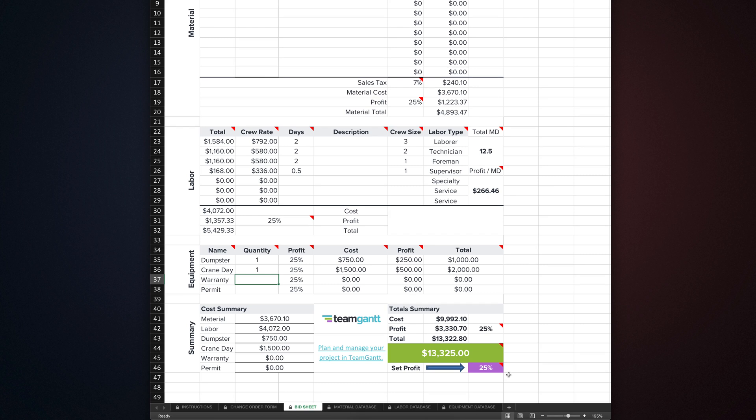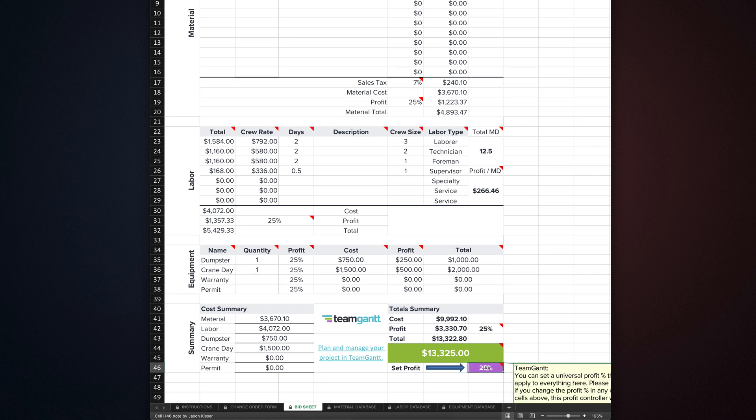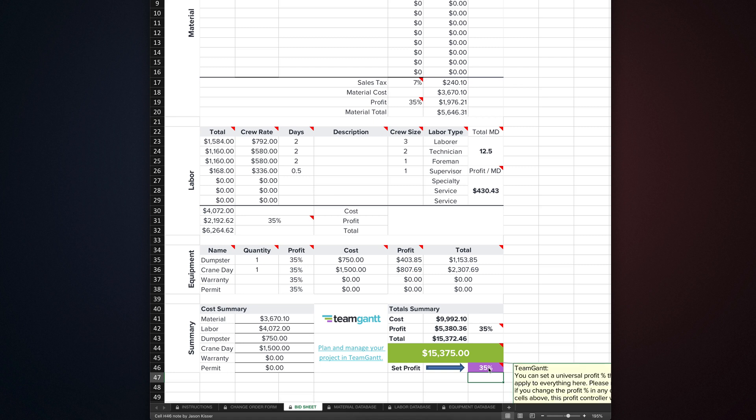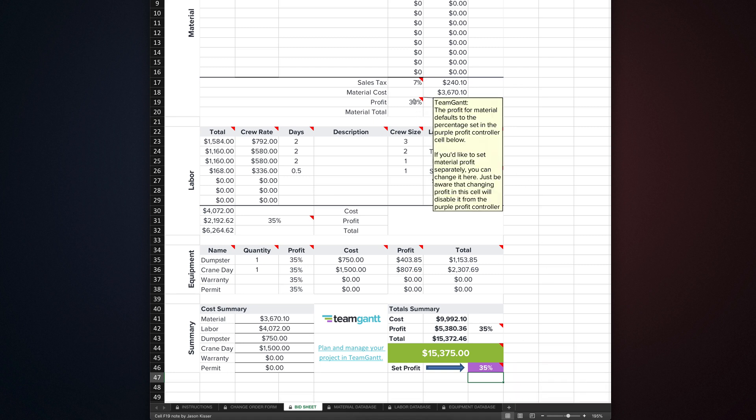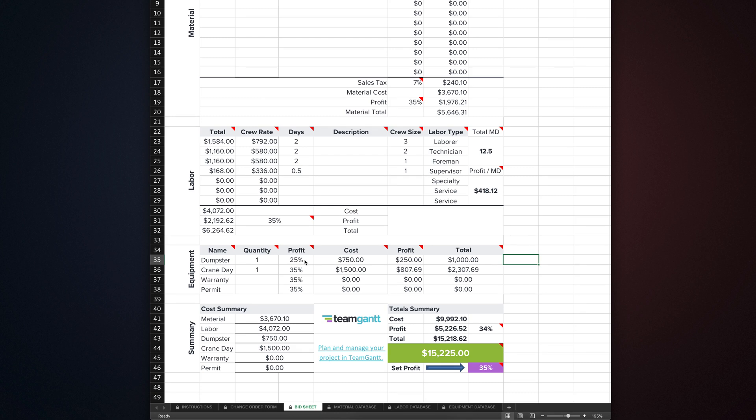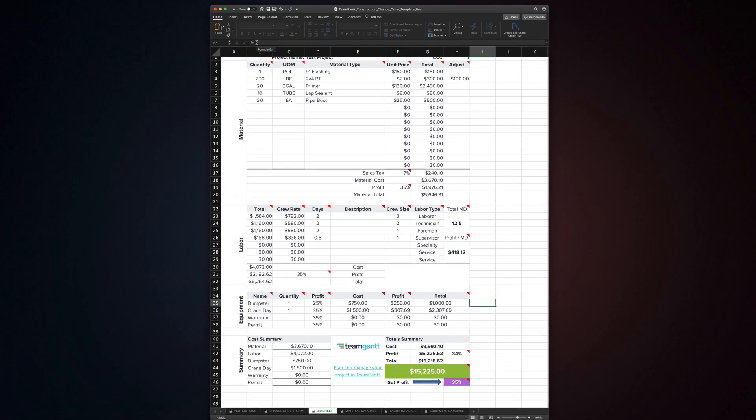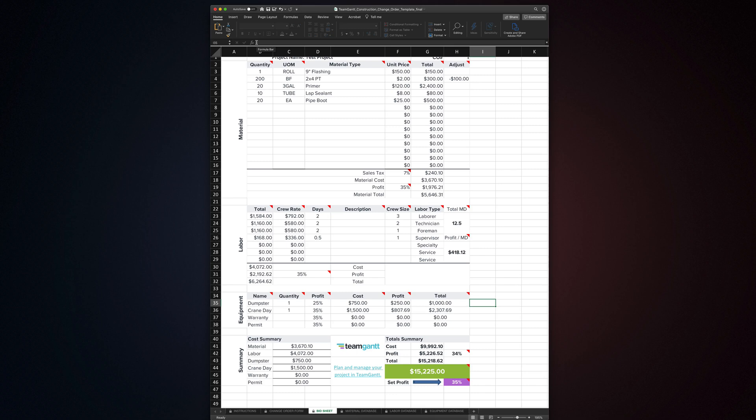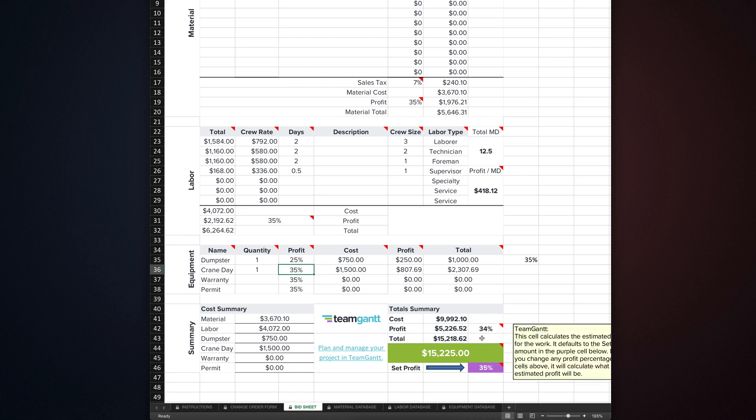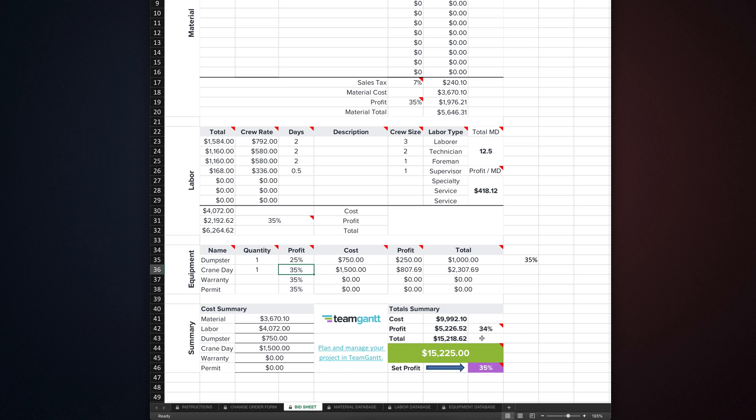Now we get to profit. The purple cell at the bottom of this page is a global profit setter for the bid sheet. If you want to set the overall profit for the change order, do it from here and it will automatically adjust everywhere else on the bid sheet. In some cases, you might need to set profit for material, labor, and equipment separately from each other. A common reason you might need to do this is if your project contract stipulates different profit percentage allowances for material, labor, and equipment, and you need to show your work. You can do this by just entering a new profit percentage in the cell for the section you want to change. Just know that if you do, it will overwrite the formula that links it to the global profit setter. So if you want to relink it, you'll have to re-enter the formula for that cell. You can find more info on how to do that in the instructions tab. Finally, the percentage listed to the right of your profit total is the adjusted profit amount. If your profit was set by the global profit setter, then this percentage will match. If you set your profit percentages individually, then this cell will display the total profit percentage of your change order after those adjustments.